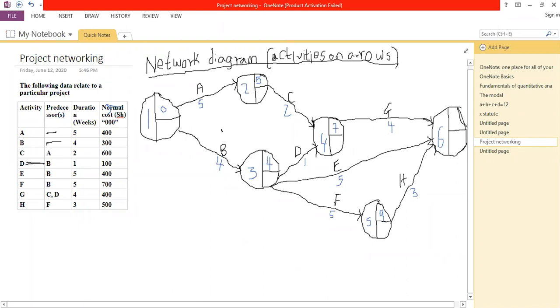And lastly, we have 9 and 3, which is 12. So between 11, 9 and 12, 12 is larger. We are going to pick that variable. Then the latest event time actually takes the earliest event time. So as we work backwards, that figure will still be the same.